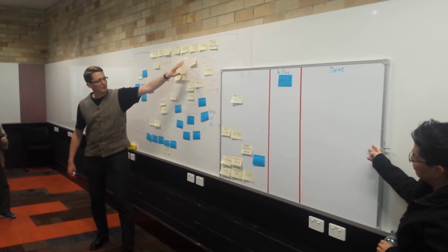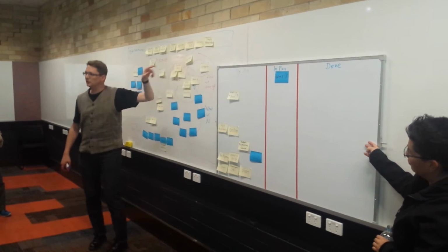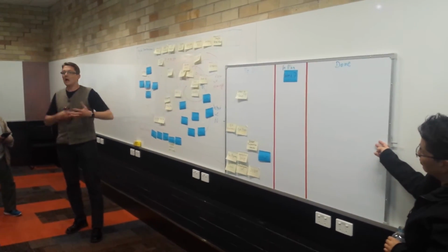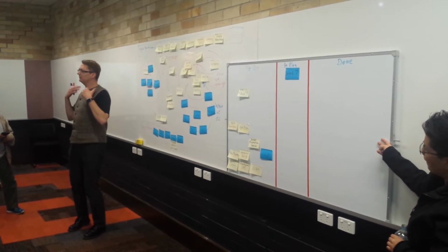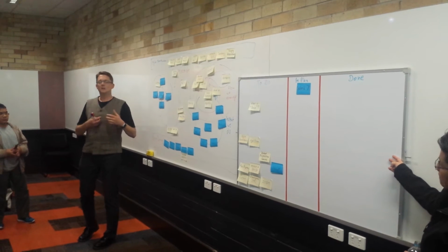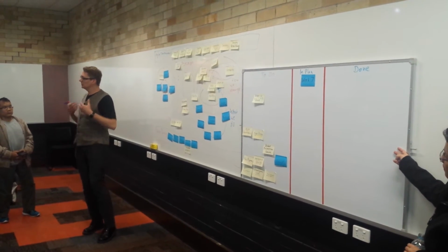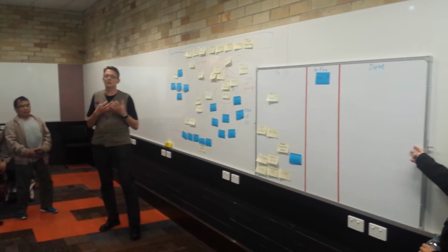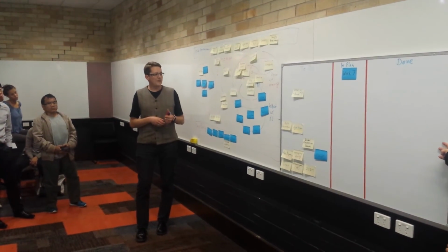We call this Scrum, obviously, and you do your retrospectives, which are to debrief and to get to grips with how the team works. This is where you reflect on how well did we do with our estimations? How do we improve that? What is our velocity? What can we do to improve our velocity in the next sprint to get better? How can we help each other out in a better way as a team?